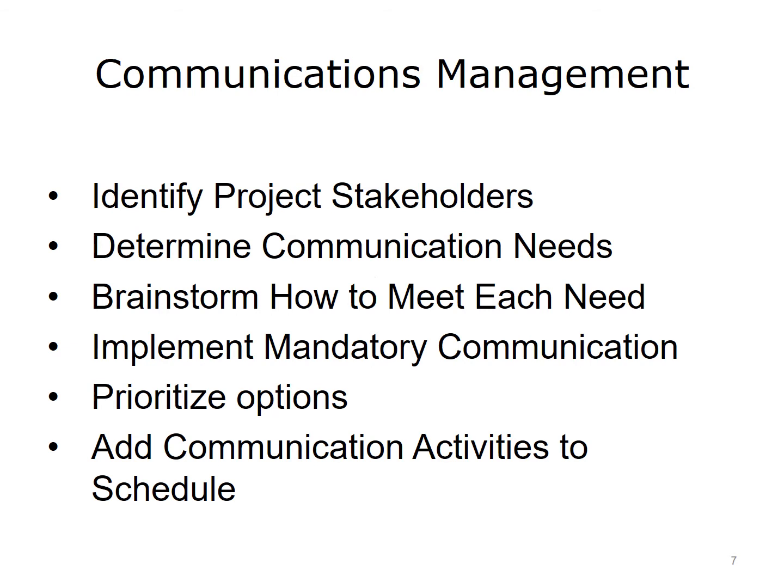1. Identify all project stakeholders. In some cases, groupings of stakeholders may have similar communications needs, for instance, a project steering committee. In other cases, you may need to consider a single person, such as a sponsor, and communicate with them in a unique way. 2. Determine the communication needs of each stakeholder. Each stakeholder group may have some similar and some unique communication needs. The communication plan helps you get the right information to the right people.